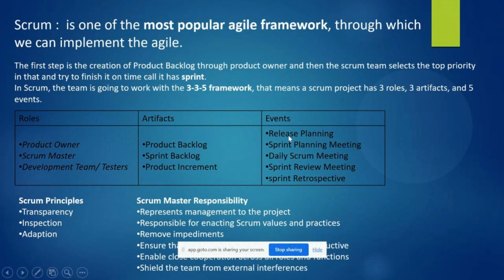Also, in the meeting we are going to discuss the sprint backlog. The four features that you are going to work on in this current sprint are the sprint backlog. We take all those in the planning meeting and plan it. This is what we need to develop, this is what we need to test, how we are going to test it, how many people we need. We discuss on that document; that document is the reference and we discuss on top of it. Did I answer your question?